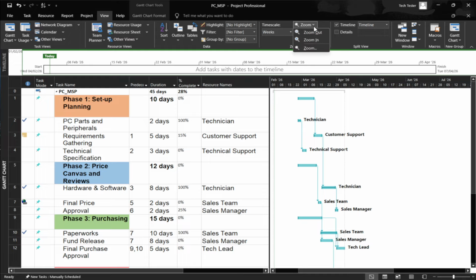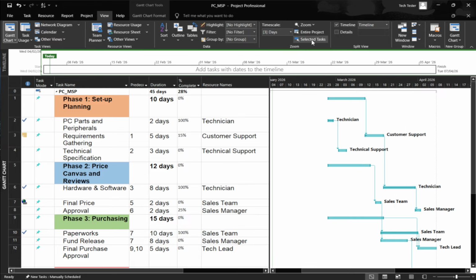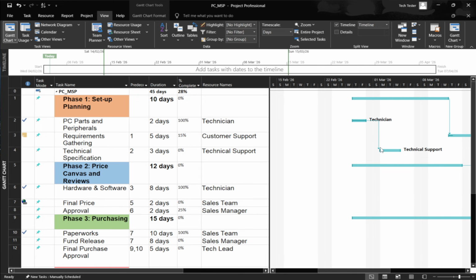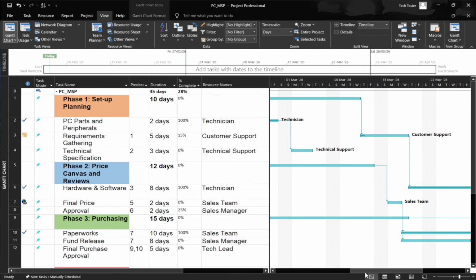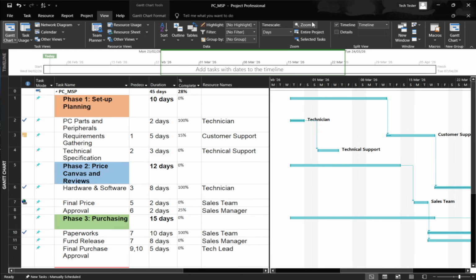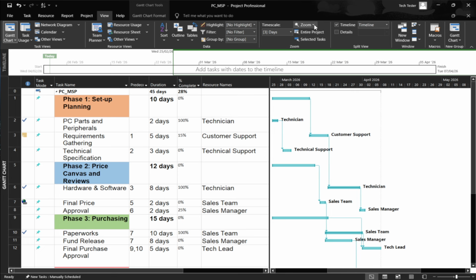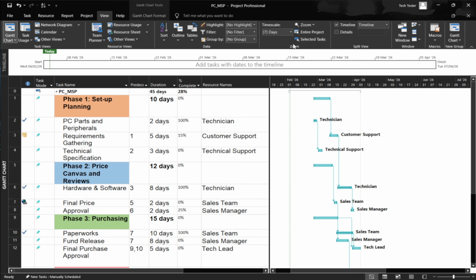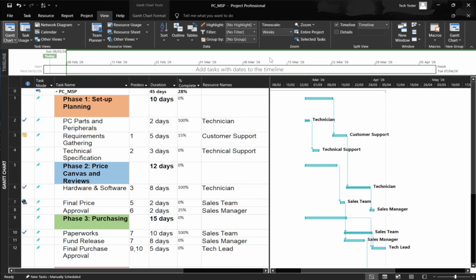Click Zoom in to show finer detail, which moves you to smaller units of time and elongates the taskbars so you can see more granularity. Click Zoom out to pull back and see a broader time range at once. If you want precise control, open the timescale drop-down and choose the unit you want: days, weeks, months, and so on. This is especially handy when you know the level of detail you need, like switching from a monthly portfolio view down to a weekly sprint view.